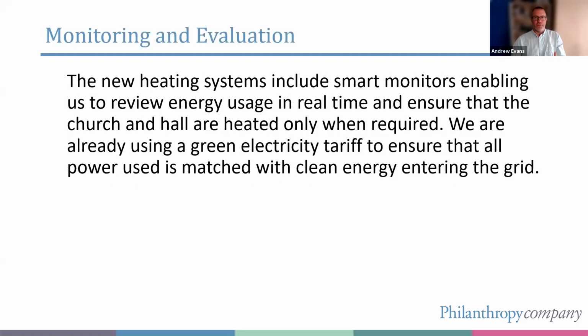So then in your monitoring and evaluation, you should be showing, how are you going to know that you've had that impact? So the way we're going to know, the new heating system includes smart monitors, can review energy use in real time, can ensure that the church and hall are only heated when required. We're already using a green electricity tariff, so we'll ensure that the power used is matched with clean energy entering the grid. And then you can say, we'll monitor the bills and we'll understand whether or not we're saving the 20% that we said we would. Okay, so you're going to talk about how you're monitoring it.